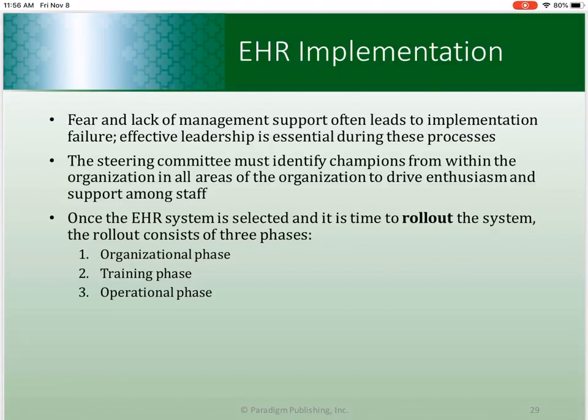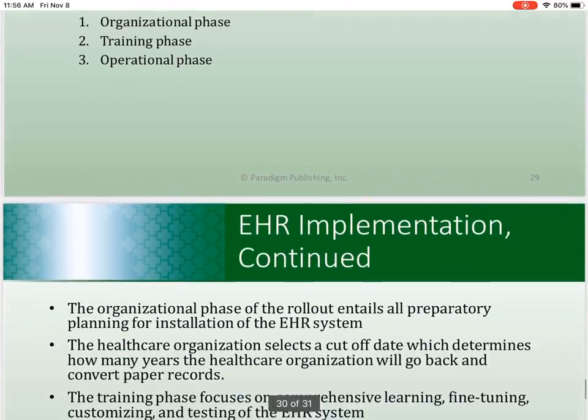And now, with the EHR system selected, your project manager in place, and the implementation plan created, our rollout process can begin. The rollout process is going to happen in 3 phases. We have an organizational phase, a training phase, and an operational phase.